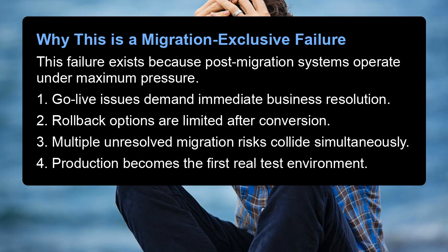Why this is a migration-exclusive failure. This failure exists because post-migration systems operate under maximum pressure. 1. Go-live issues demand immediate business resolution. 2. Rollback options are limited after conversion. 3. Multiple unresolved migration risks collide simultaneously. 4. Production becomes the first real test environment.